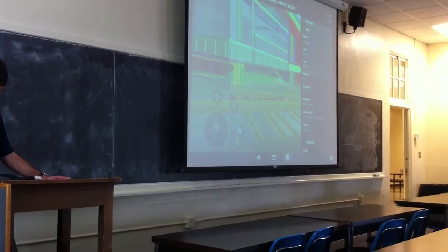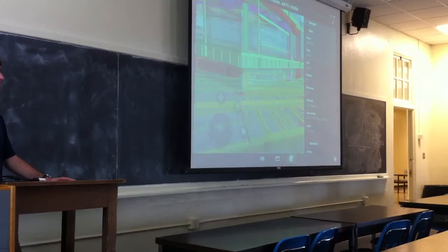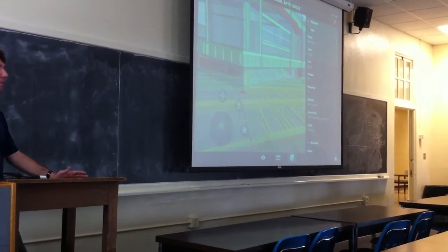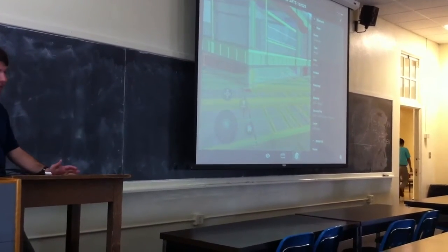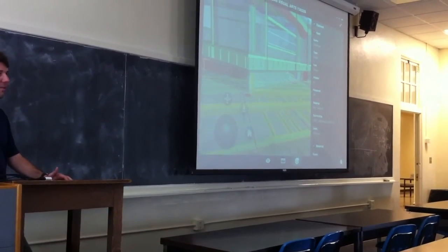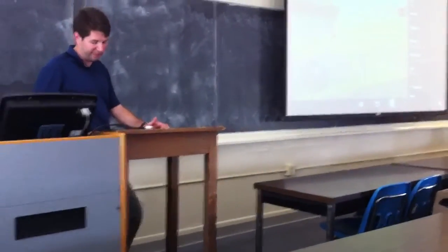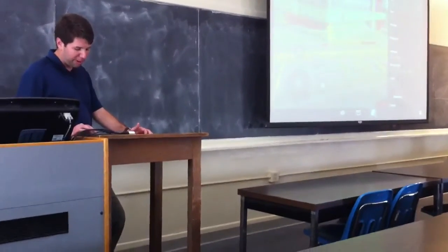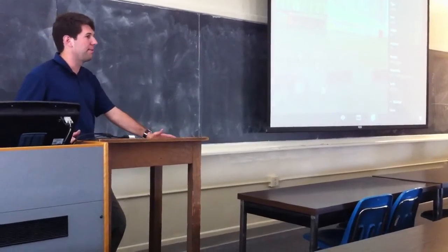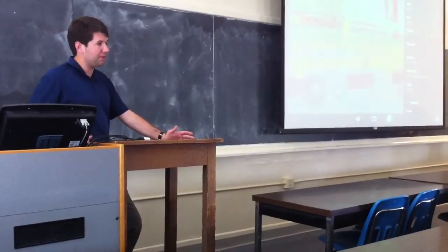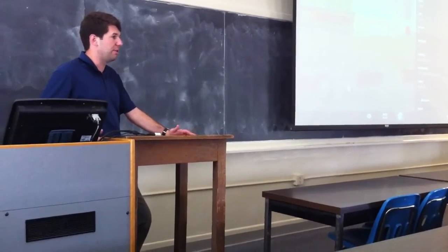And you can kind of see, if I take you through one of the earliest changes on this bottom structure, we went to joist because this is a level 5 museum quality finish. There are 14 foot ceilings in these galleries, and the bottom of the steel is only 17 feet. So there is not a lot of room to work with above the ceiling. An early change in this project was we went straight to joist, to Arduous rather than beams, so we could get through these things.